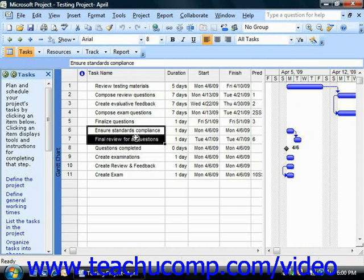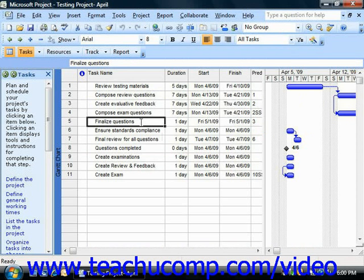First, you must create a task that is placed above the various subtasks within the phase. You do not need to set a duration for this task, as it is a summary task, and that means that its duration is calculated by the sum value of the durations of its subtasks. So you would simply name the task whatever you want the phase to be titled, and then save the task.